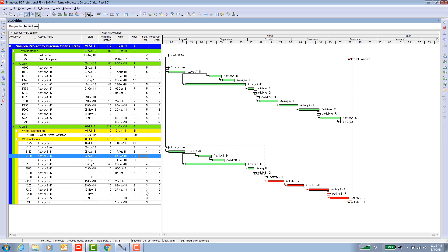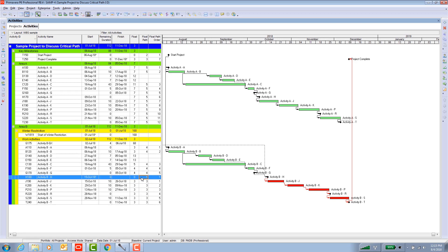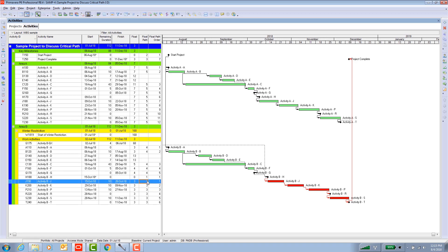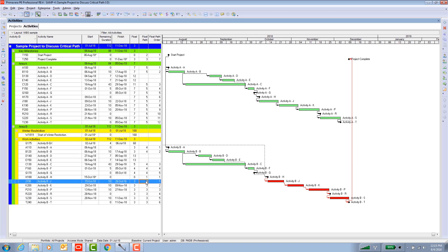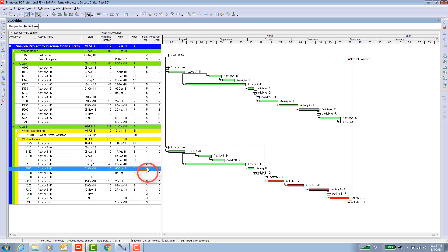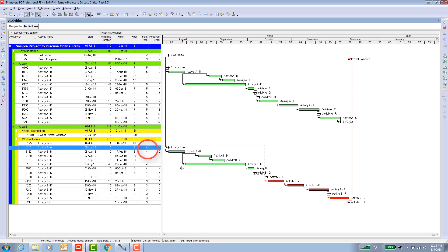So all the lower number float paths are down here. So you as a schedule engineer, you can kind of put two and two together and see that the driving path started on the gap activity. And then float path number two was the project start activity. And then float path number three was everything from project completion back to the gap activity. And finally, float path four were these other activities in area B.